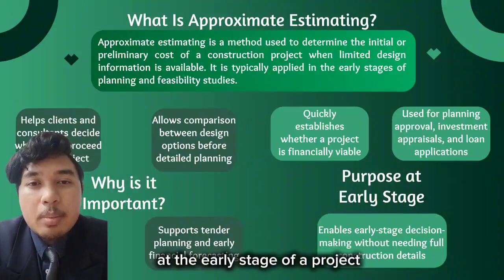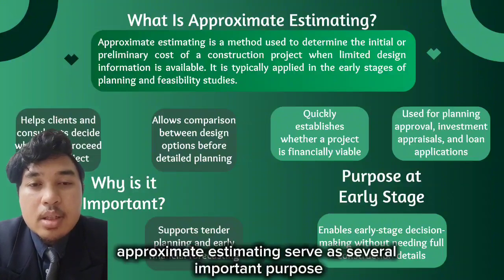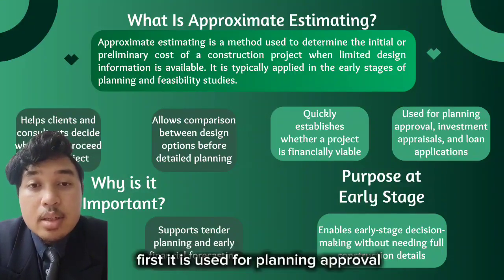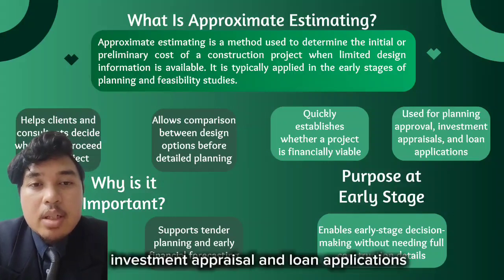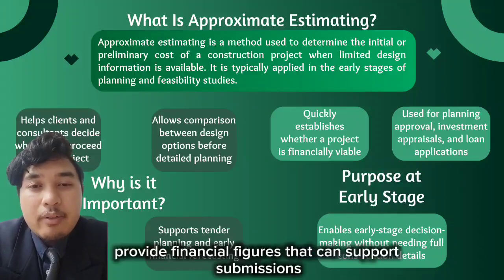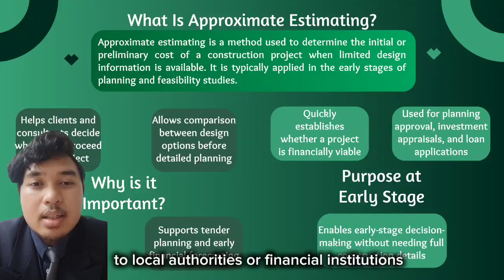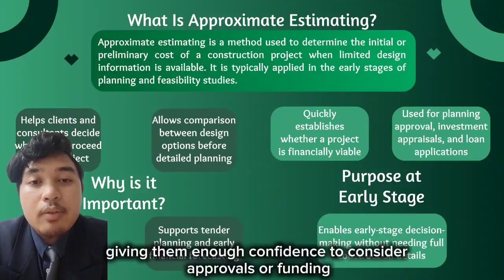At the early stage of a project, approximate estimating serves several important purposes. First, it is used for planning approval, investment appraisal, and loan applications. These early estimates provide financial figures that can support submissions to local authorities or financial institutions, giving them enough confidence to consider approvals or funding.